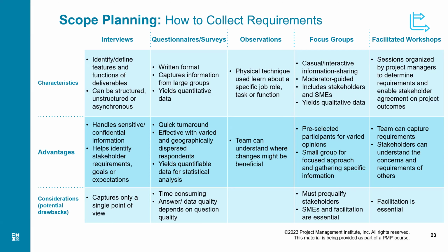And what are the advantages? Naturally, because we are more intimate, we can handle sensitive and confidential information. And there is no chance of groupthink here. There is no chance because there are two people talking to each other. So nobody else's ideas can influence us, right? Nobody's senior, nobody's junior. I am an interviewer and you are an interviewee, and I am asking questions and you hold the data, and you are trying to intimately communicate back your answer.